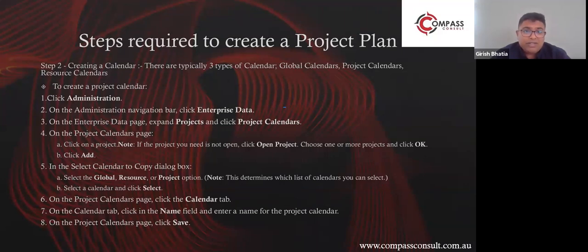Basically all the resources that you have in the project are not going to work on the same time. The design team is going to work for like 5 days. The execution is working for 7 days, sometimes 6 days. Sometimes they are working 2 shifts. There are some resources which are very rare, and they are just working for 3 days a week, like inspectors, or people who are going to give you the statutory certificates.